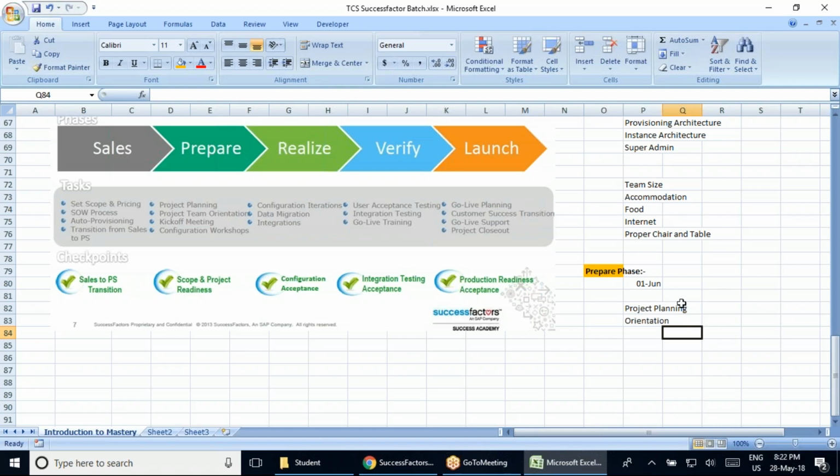So again, you will inform them what the team size will be, what the duration of this project will be, and who's going to be involved in this project. And then apart from this, you will also have the escalation matrix. All these sections you will prepare for the orientation in the form of a PPT, and then you will take your kickoff meeting.